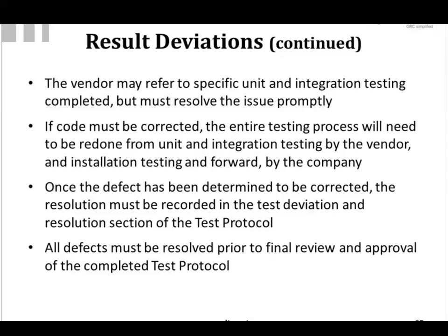You may actually have a new instance of the software that has to be installed in your test environment, and in that case, you have to follow and do the IQ for that software installation, and then do the OQ and PQ again. So it's important to try and do some trial runs on these types of tests.